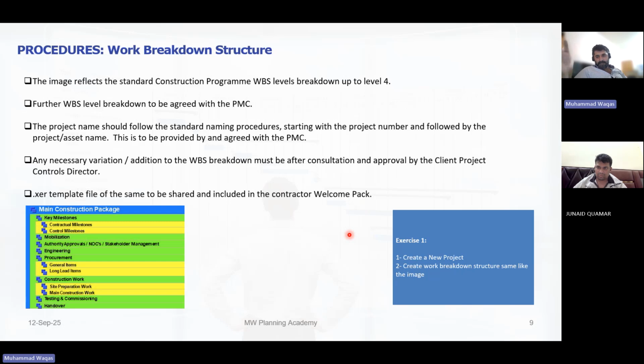That feature is for when, let's say, you have an update of September, and your project was started in January, so you have a baseline of January. You have an update of September, and then there is also an update of August. So now you want to compare these three. In that case, you will assign primary and secondary baselines, just to see whatever data you have.